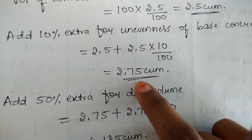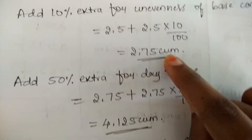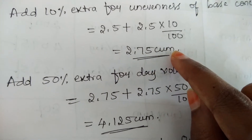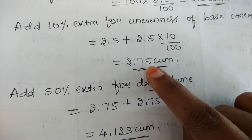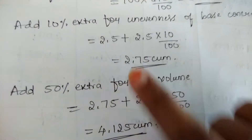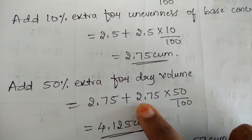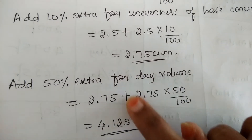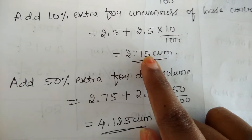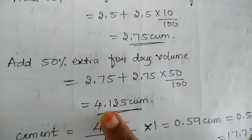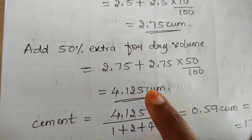So this gives you the new volume of concrete including the unevenness of the bed. Now for this new volume we again have to add 50% extra for the dry volume. This is the volume of the wet concrete; for finding the dry volume we have to add 50% more. That means 2.75 plus 2.75 into 50 by 100. On adding these two things we will get a volume of 4.125 m³, which represents the volume of the dry concrete.